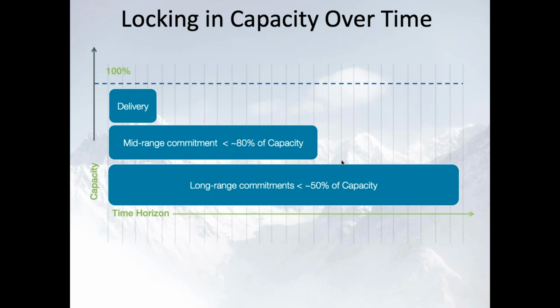So instead of thinking about how well did I accurately plan annually and how do I update the accuracy of my plan, you think on an annual basis of how well did I do at staffing my organization and putting people where they can provide the most value to the business, and work on the prioritized business that the business would like, so the prioritized backlog. And then on the quarterly basis, you look at it and say, based on the value they're creating, the backlog that they have, the list of new ideas, do I need to shift capacity across these teams?